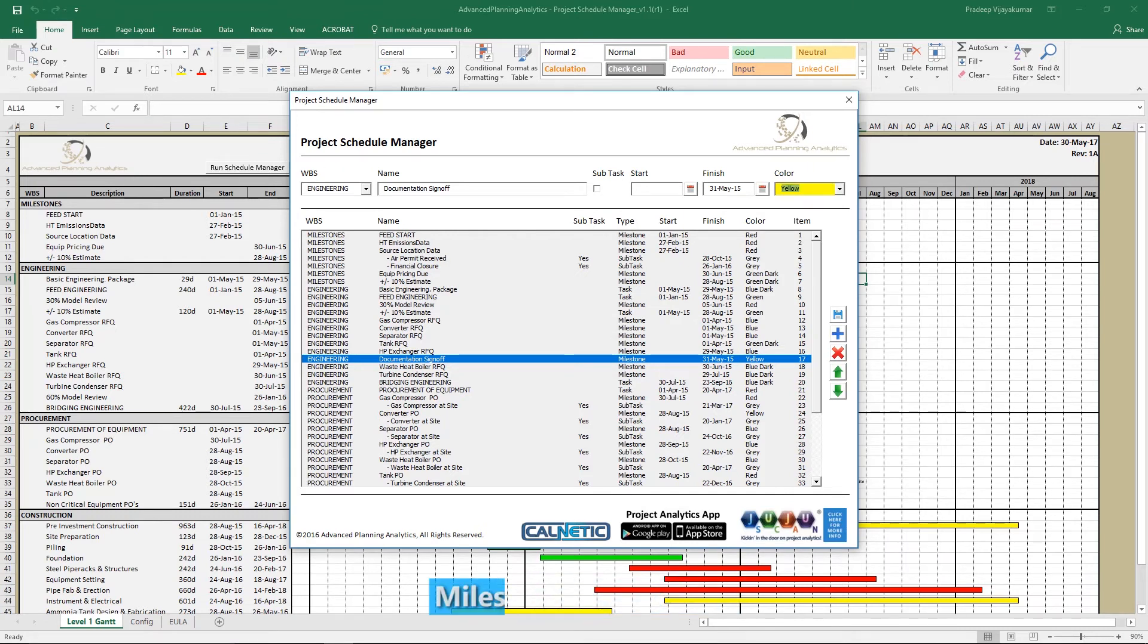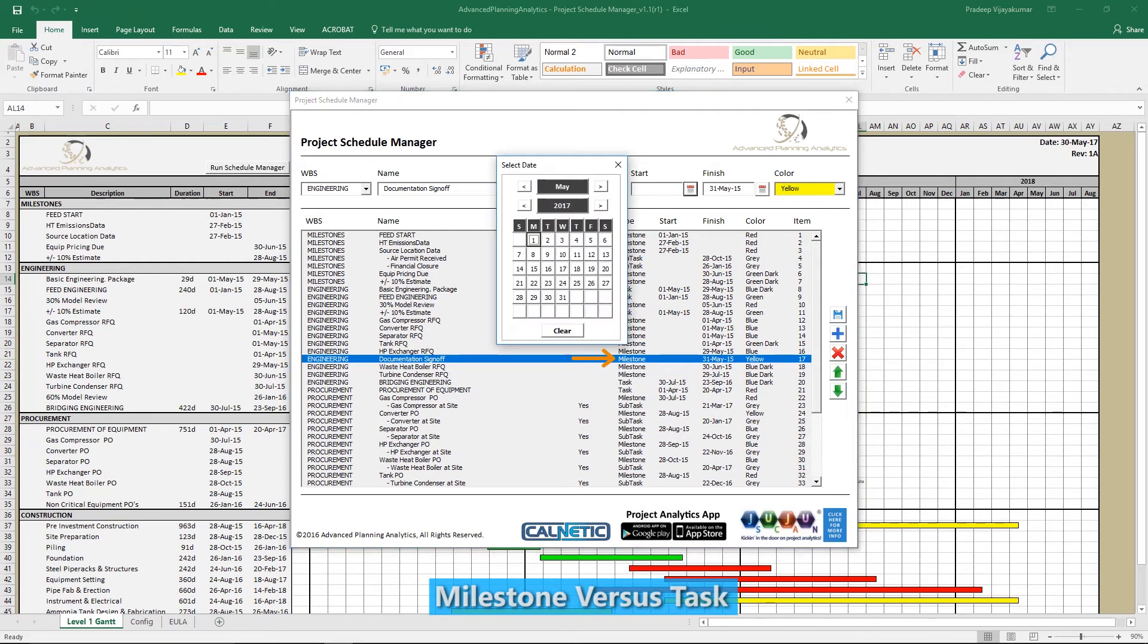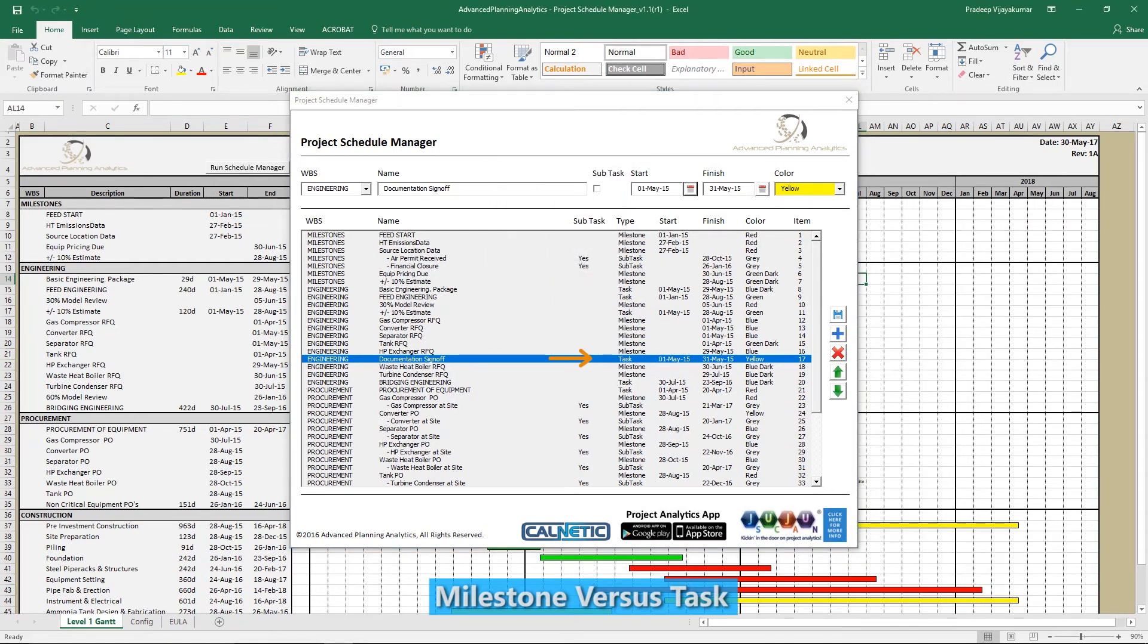Note that if you specify a start and finish date, it's recognized as a task. If you only add a start or finish date, it's recognized as a milestone.